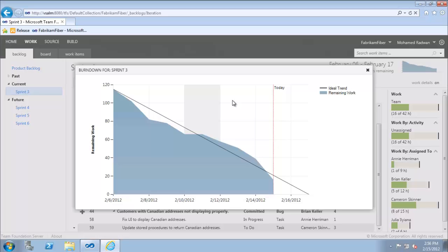I believe if we are about to deliver 10 user stories, we may deliver 8 or 9 user stories but completed. And there is a lot of talk about the definition of done, about the work being done. So delivering fewer user stories is better than delivering all the user stories without completing each one. So this is very important here in Agile development.